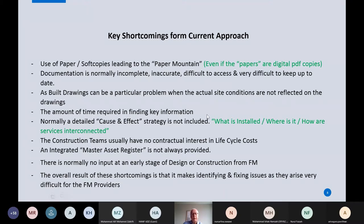This is of particular relevance to the people on the call today regarding as-built drawings. A lot of the time, the so-called as-built drawings don't reflect the actual site conditions and don't reflect what's hidden. This only becomes apparent when something goes wrong. You and your team can spend an inordinate amount of time trying to find information in this format - and you may find it once, but then it's taken up to the plant room and not seen again.